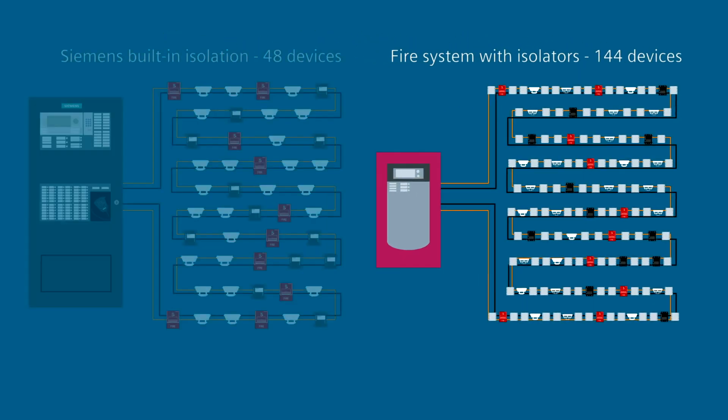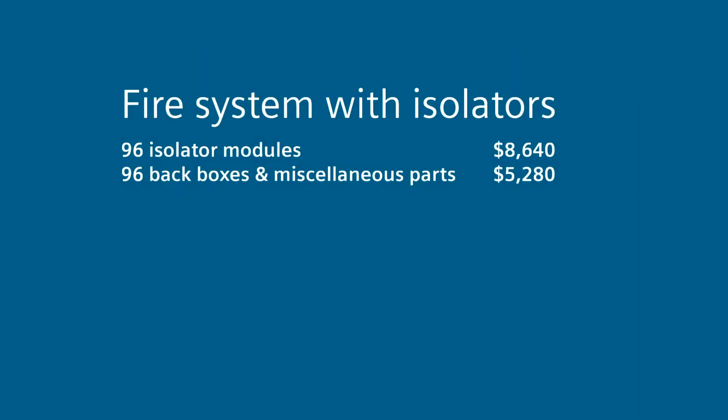With Siemens, there are no back boxes or miscellaneous parts for additional isolator modules. You see the calculation for the other system that results in over $5,000.